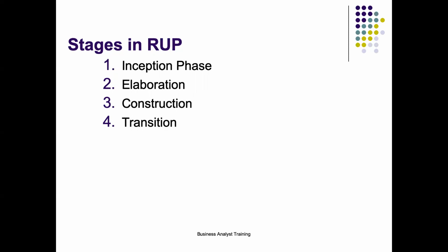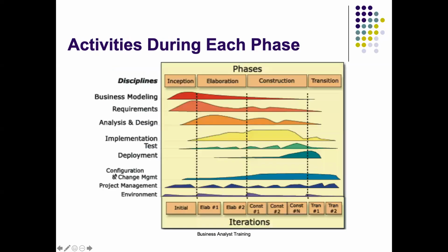So once you have done that, there is a stakeholder agreement that needs to be done. Yes, this is what needs to be built, this is how much time it will take, and this is how many resources are needed. So I would say it is a scoping or project management exercise along with stakeholders, to put it in simple words. That is what the inception phase would ideally be.